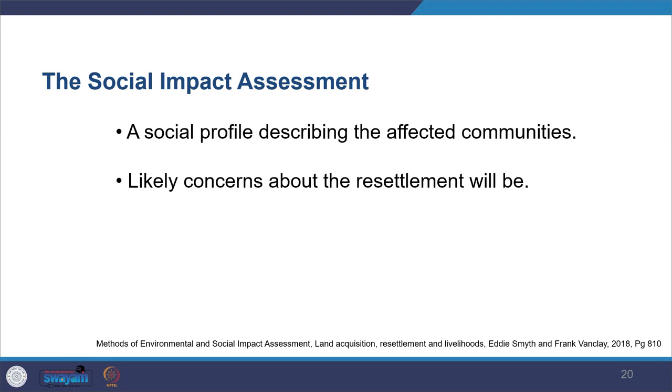And when you undertake profiling and baseline data collection, the key outcome of this process is that you prepare the social profile. You let people know what the scenario is, what the social profile is, and you need to describe the affected communities. So the people who are going to be affected, you need to describe them in terms of numbers and in terms of their characteristics. And another thing you would need to come up with is what the major concerns will be about resettling those affected people, whether they are resettling from the economic point of view or from the physical point of view, and what the key concerns associated with that are.